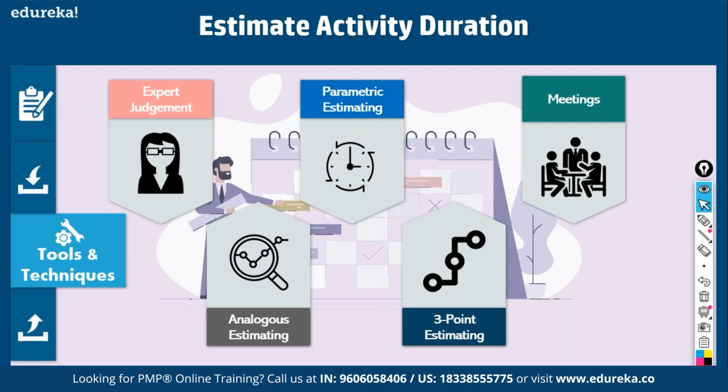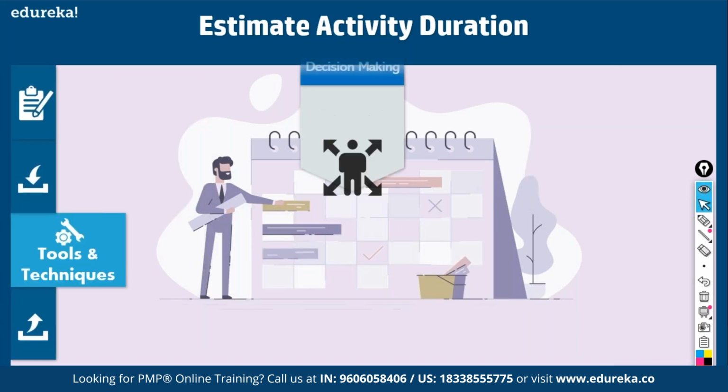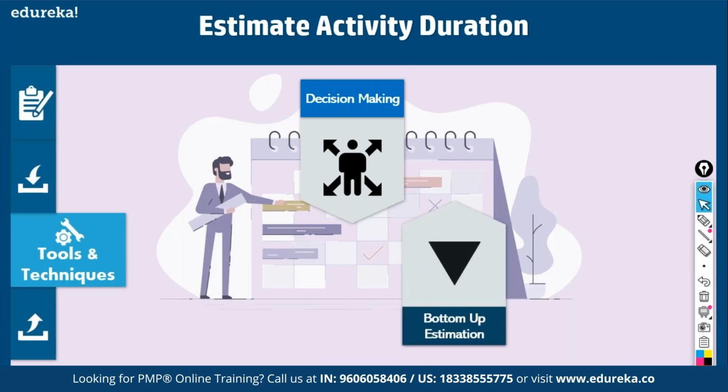Okay. Then for this, you also have meetings. Fine. Data analysis. Okay, you have to analyze different data relating to productivity, team members' competencies, and so on. So that is data analysis. Then finally, what happens? We come to decision making. So once you come up with a duration estimate, the work package managers would be meeting the project manager, and the project manager would be settling these budgets, isn't it, timelines. So that is called decision making. Fine. So bottom-up estimating is where you know the activity level information and you work it upwards, from work package upwards. That is called bottom-up estimating.